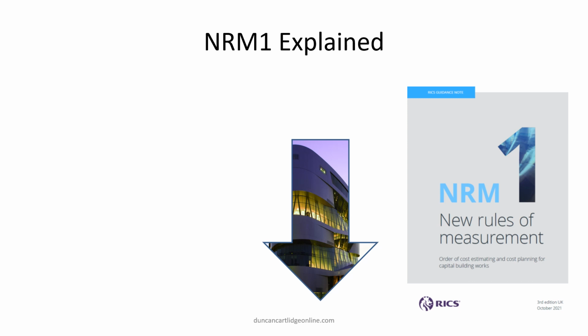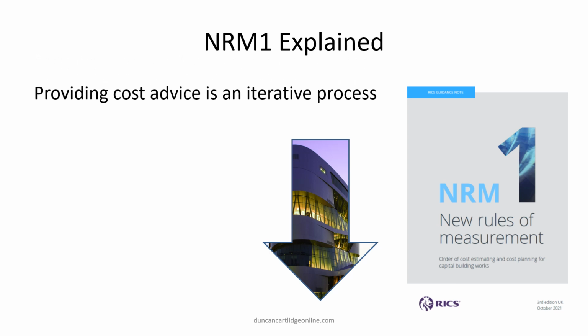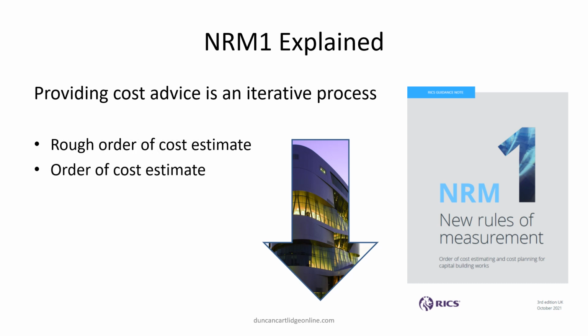Providing cost advice is an iterative process. That's to say, it is continuous and hopefully becomes more accurate and detailed as the design progresses. This page lists the stages recommended by NRM1. Whether in practice all these documents, particularly the number of cost plans, are prepared is debatable.